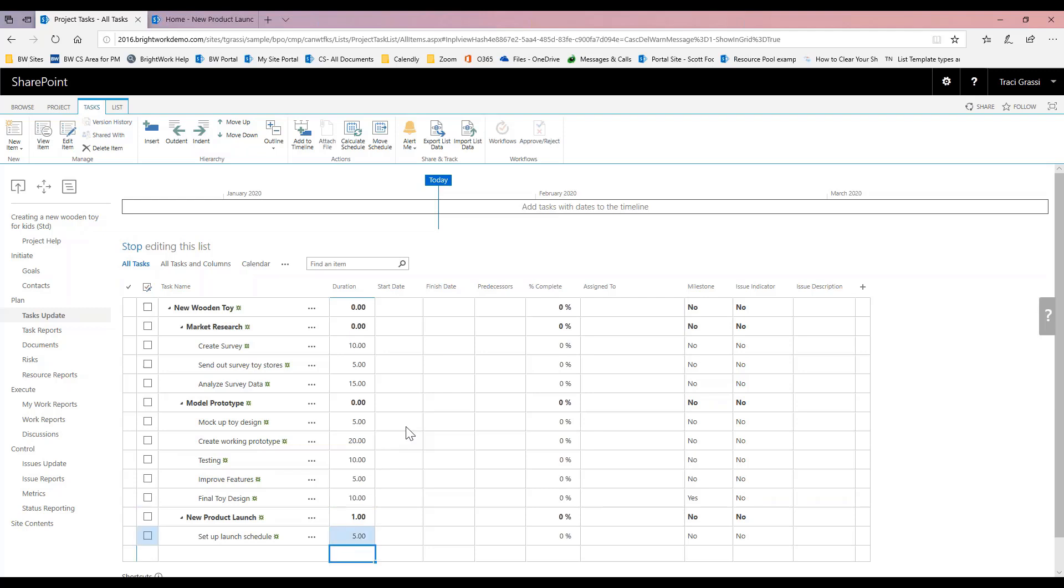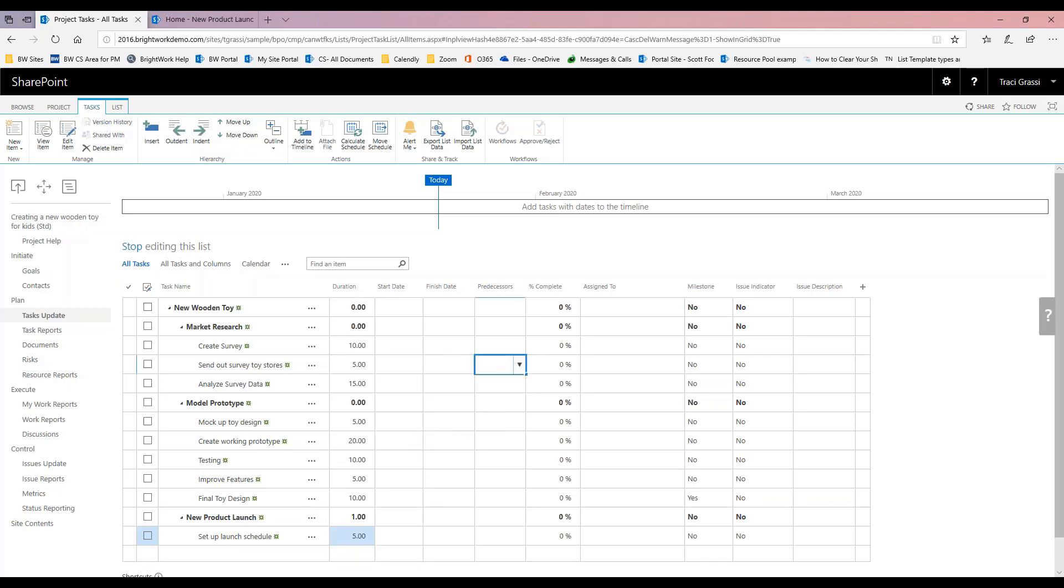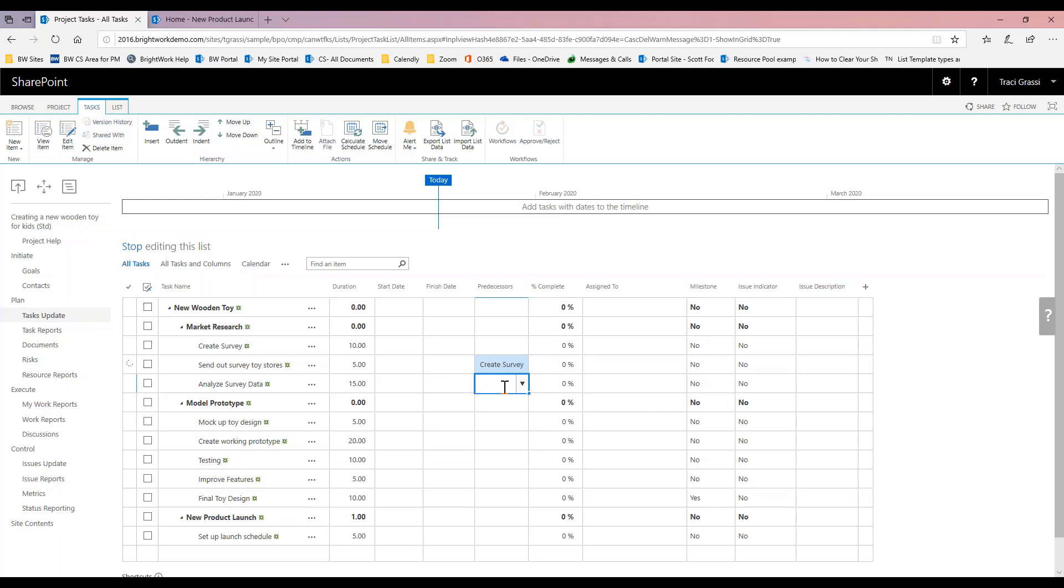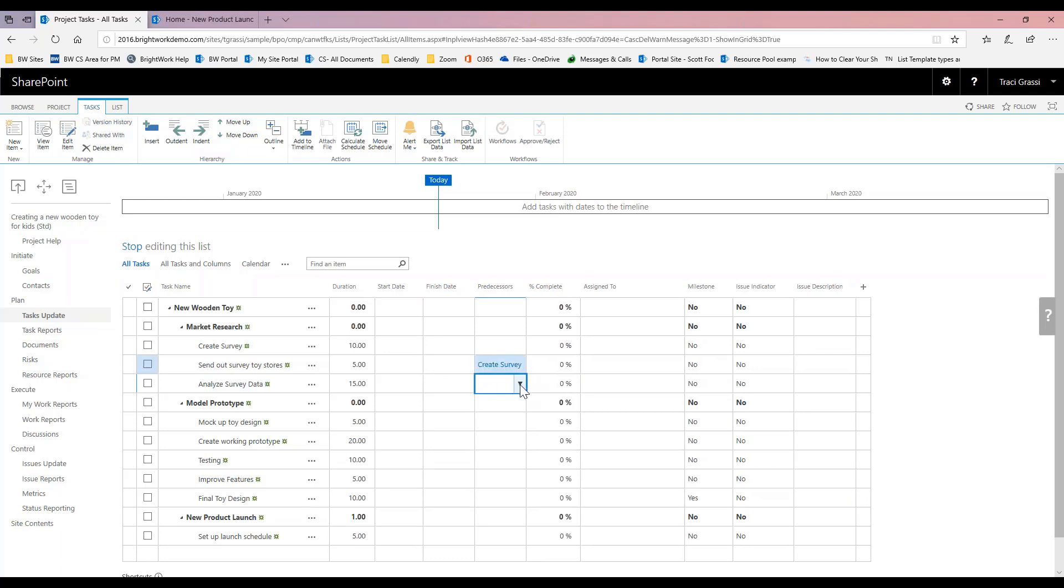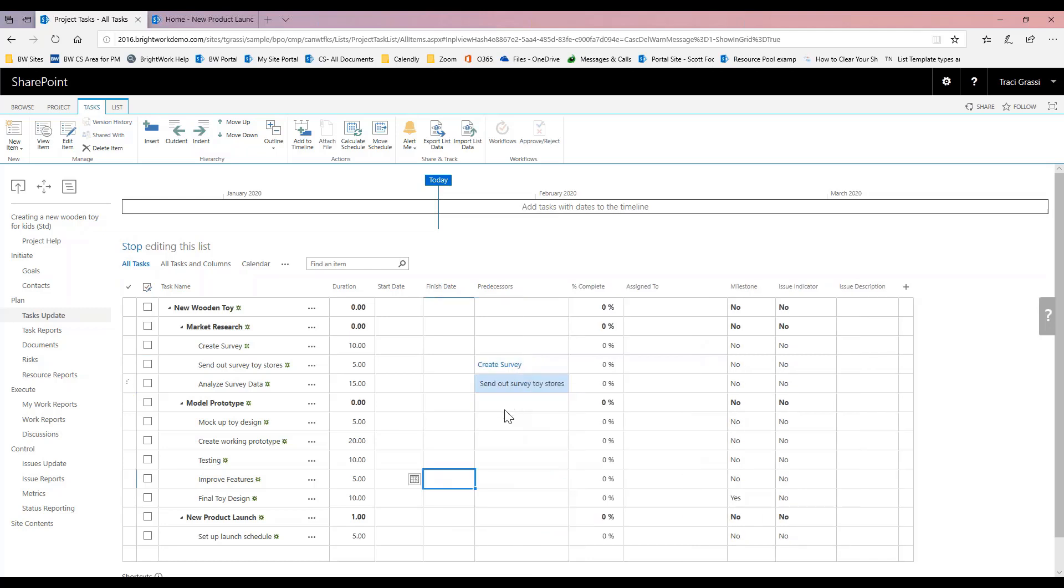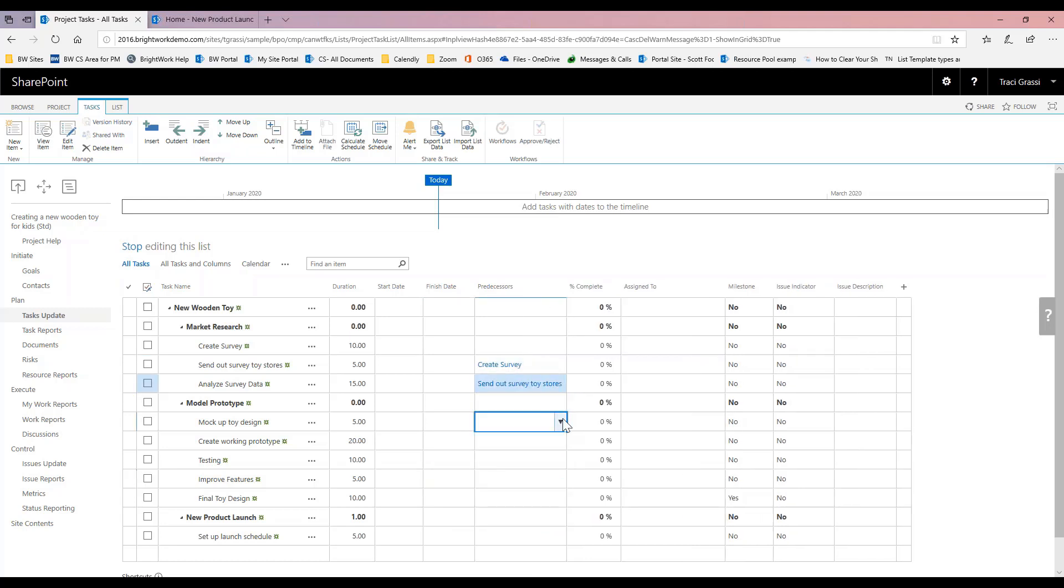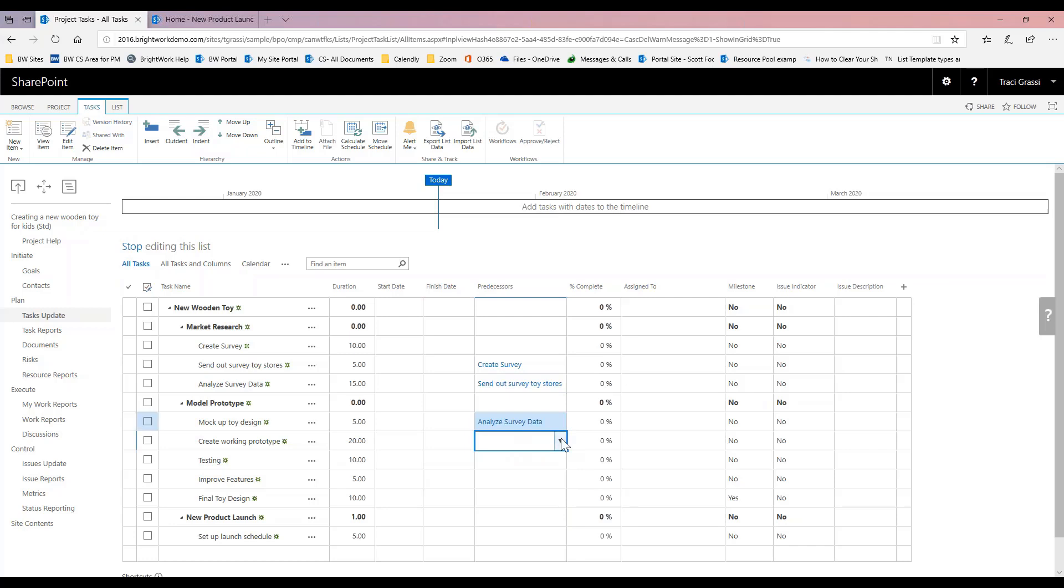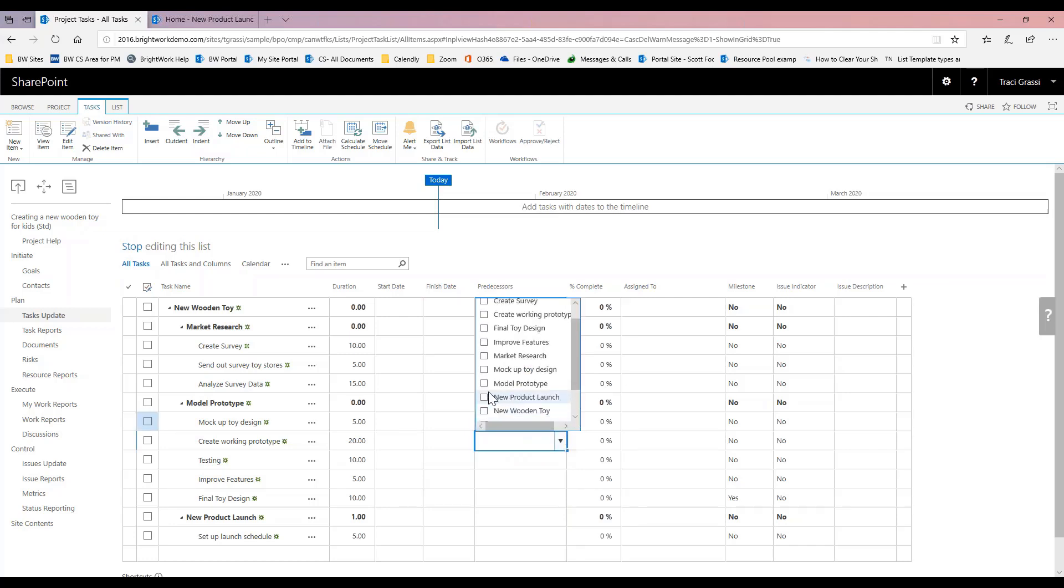Now that I have that in here, my next thing that's very important are my predecessors. I'm just going to do this in a waterfall approach, so I'm going to say here create survey, and the next one is to send toys out to the stores, and then here we're going to analyze the data and so forth. We'll just kind of mock these up.